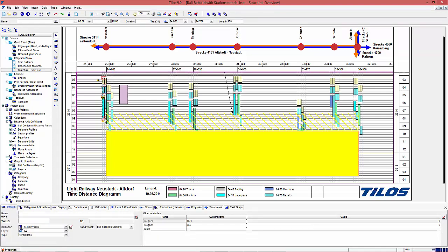During reschedule, the coordinates of the category or summary task gets recalculated. Based on their hierarchy level, the summaries get the smallest and biggest coordinates of the content tasks. What does that mean for the specific summary? It will take location and time from those 3 tasks.